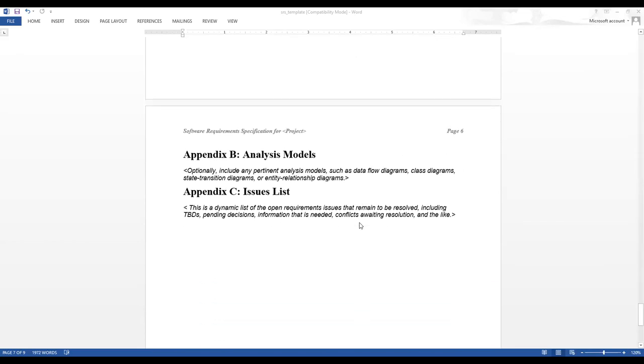Issue list. What type of issue list have we already collected? If there are issues like there are delays in approvals, we need to proactively mention here there are some delays we have come across for approving such documentation process. This might delay the start of the project and so on and so forth. Whatever is being affected due to these issues, I'll mention it over here. Okay. This concludes the SRS.